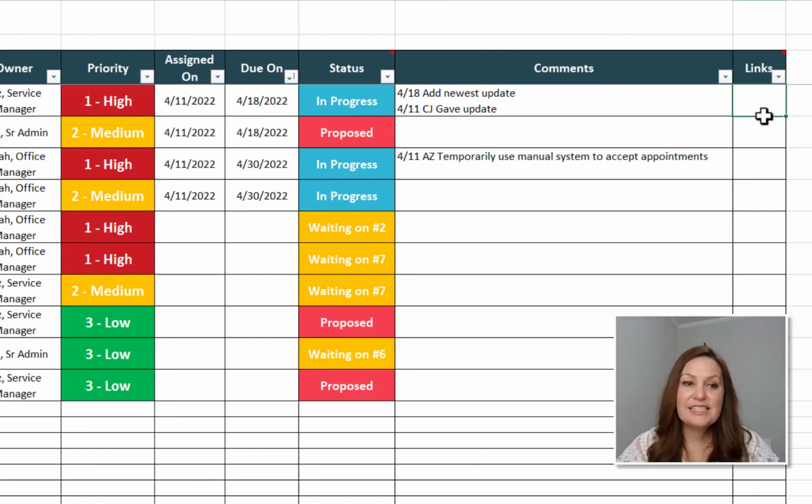Now, if we establish those 3 tiers, is there any documentation? Where can I see that? Can you show it to me? Can you send me the link or the file? This is what we'll ask our team member, and then we can link it there in this column J, and that will help us to establish that this is actually completed and there's documentation that supports that. So that's just a subtle way for you to drive accountability in your actions.